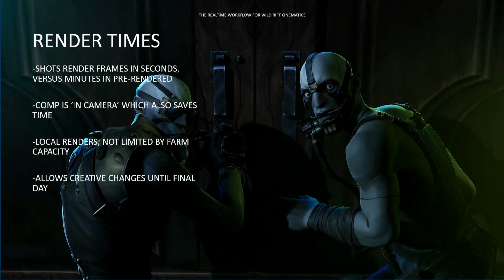So the impact for us of rendering on Unreal is that our render times were a matter of seconds rather than minutes or hours as they can be in other shows, which was obviously a massive saving for us with our time frame for this episode. And in addition, because we were working in Engine, we didn't have a separate compositing stage, so that saved additional time in terms of exporting files, importing files, and then also rendering your comp. Because it was all done in camera, it meant that it was just one export. It took a matter of seconds or minutes for a shot.